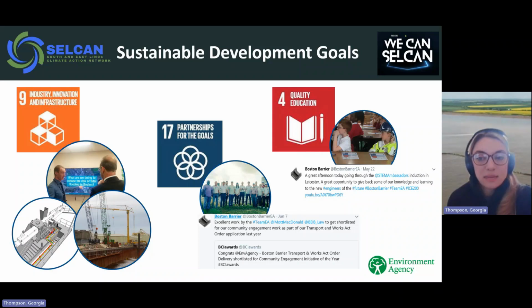So the BIM model helped us build it twice. In a collaborative space, we built the barrier over and over again, many times virtually, so we only had to build it once in the right way, built physically. This not only helped us to save money, but also reduce carbon and helped us test health and safety features of the barrier in a safe way, which I'll go over more in the following slides.